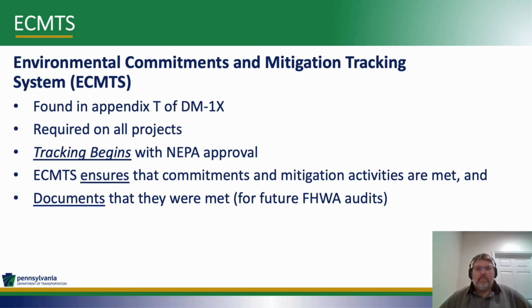This policy is in Appendix T of Design Manual 1X. It is required on all projects, and we start tracking with NEPA approval. So during the NEPA process, we identify the mitigation commitments that we're going to take. Once that approval happens, whether it's a categorical exclusion evaluation, an environmental assessment, or an environmental impact statement, once those approvals happen, then we start tracking what happens to them after NEPA.